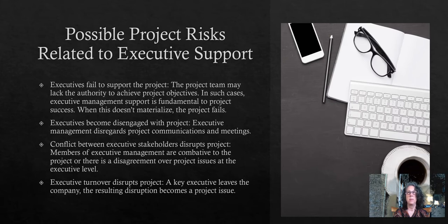And with this particular project, the project itself did become the punching bag between the executive decision makers within this organization as they tussled for control, not necessarily control of the project, but certainly there were some power struggles within the organization, and this project was something that was used competitively amongst those senior executives, and that can be common with large projects that have big budget line items.